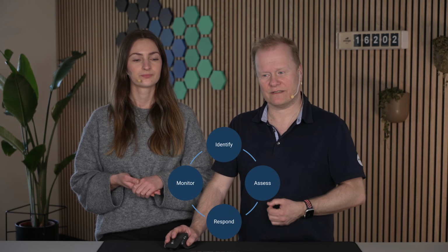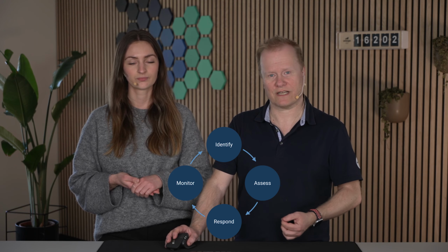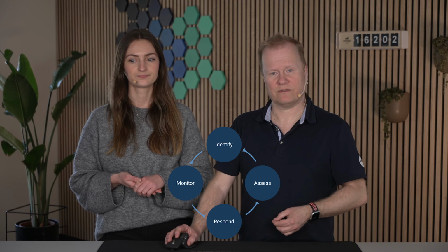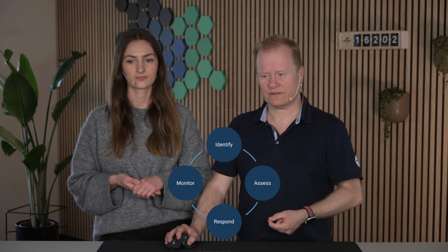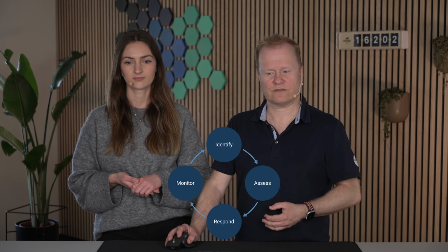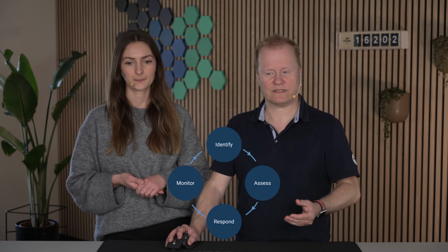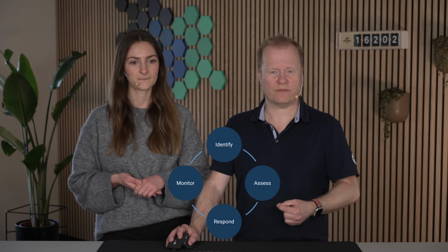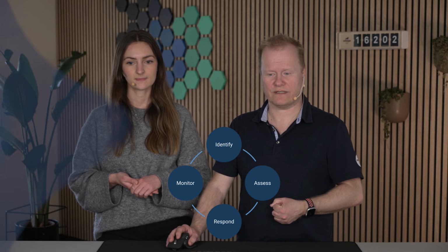Yes, and a structured risk process starts with identifying the risks, assessing the consequences and the probability, planning the response and identifying measures, then monitoring the risk status. There could be new risks, changes to existing ones, and of course follow-up of the measures that have been identified.